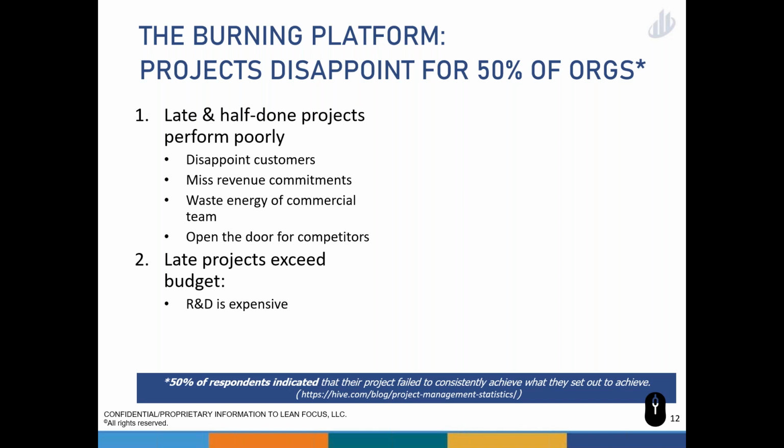And think also of the sales team who's gone and taken training that they won't be able to use for 4 months. There's a lot of wasted energy of the commercial team, and it also gets the commercial team to where they're only in the seeing-is-believing mode, which isn't good, because that inserts more delay in getting our future products to our customers. And you leave the door open for competitors. You go out, you show this new thing that people need, you demonstrate it, and then you can't fulfill it, which now has people looking at your competitors. So late projects create so much waste for your company. And of course, late projects exceed budget. When you have to do something twice, it just costs more.